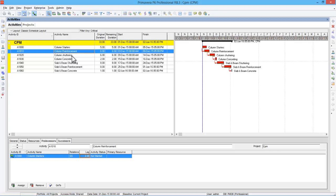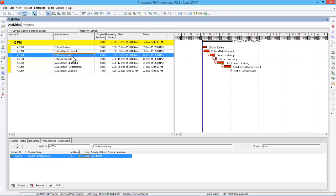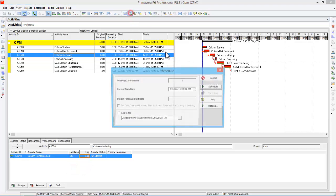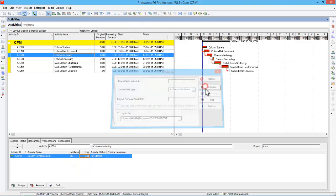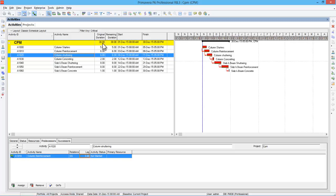In the same way, column shuttering can actually start after the third day of column reinforcement. Go to the relationship, change it to Start-to-Start, and give a lag of three days. After scheduling, the duration changes from 36 days to 30 days. This is how you do the work in parallel using fast tracking.